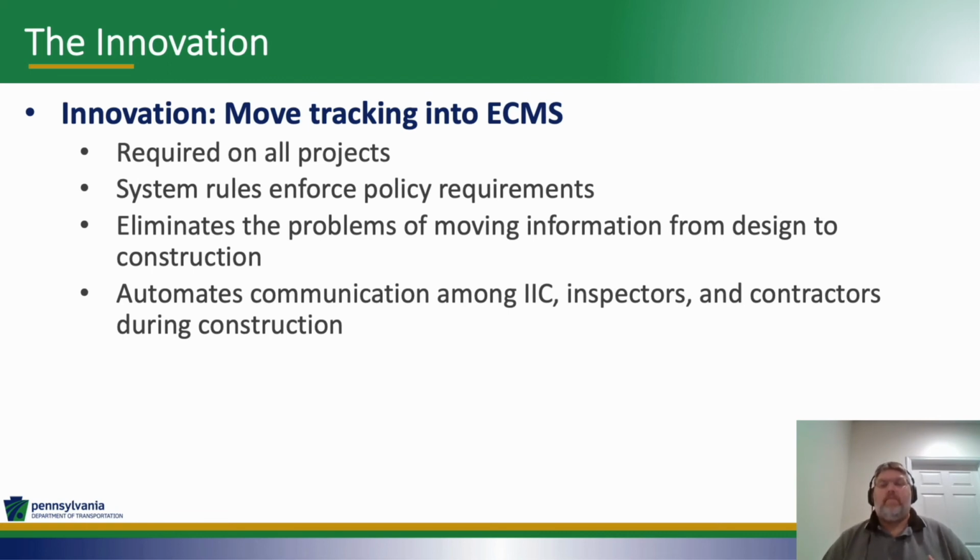And we can do things like make sure that everything that needed to be done prior to advertising is actually completed and that the project development checklist is up to date based on what's actually in the system. At the other end, we can make sure that the project isn't finalized until all of the construction mitigation items have been closed, and there's a process for closing them in the system when they're completed during construction.